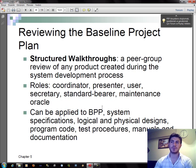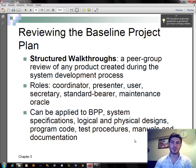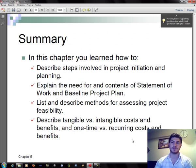Reviewing the baseline project plan involves structured walkthroughs — a peer group review of any product created during the system development process. Roles in a structured walkthrough include: Coordinator, Presenter, User, Secretary, Standard Bearer, and Maintenance Oracle. Structured walkthroughs can be applied to the baseline project plan, systems specifications, logical and physical designs, program code, test procedures, manuals, and documentation.